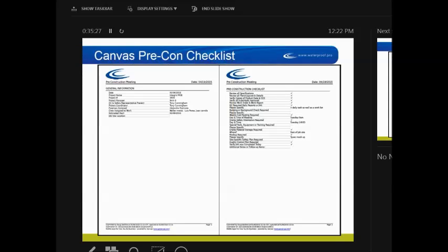All right? Go through your work order. If you've got air barrier, you should have details. You should have layouts. You should have the specs all in your Foreman folder for everything. If you don't, that's when you raise your hand or you write it down at the end of this form. Those are called follow-up items. That's what we need to get you so that when you get to that scope of work, you have what you need. But you certainly should have everything for what you're starting.